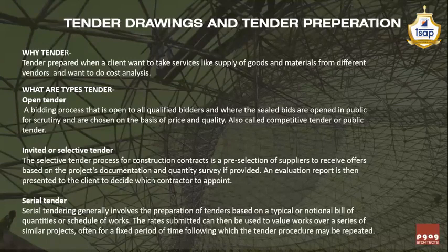And then as a designer also, you are part of the scrutiny of comparing the bids, to guide or educate the client on where the cost proposed by a particular vendor or contractor is more, and why it is more than the average cost.